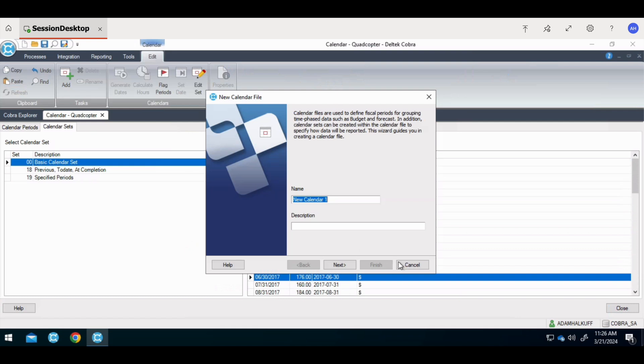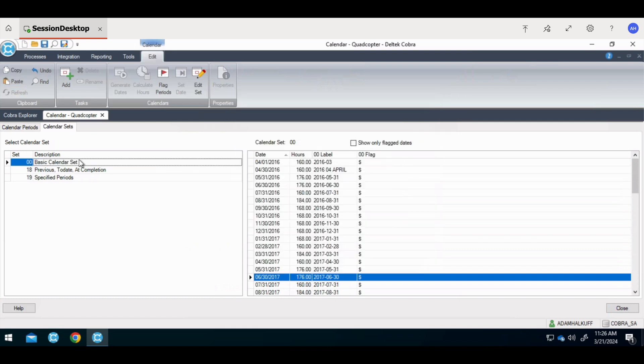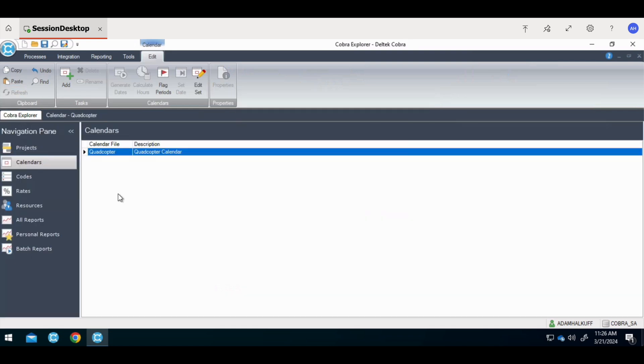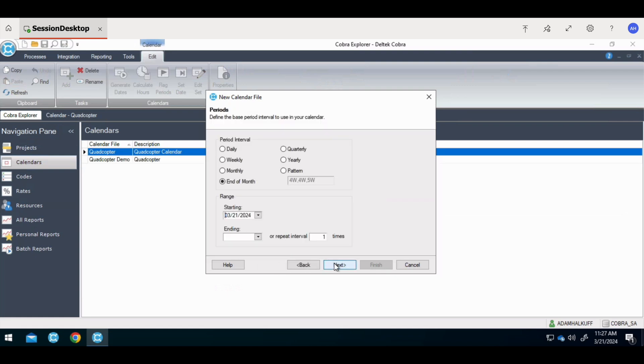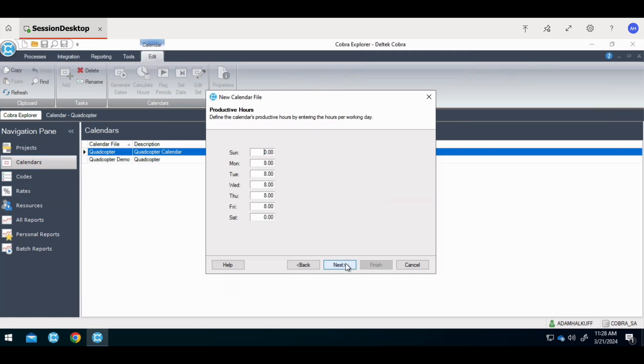To create a new calendar file, we're going to choose new calendar file. We'll name this calendar file and give it a description. It's important to remember not to name the calendar file the same as any other file. In the periods dialog, select the end of month period interval. This will end our fiscal period at the end of every calendar month. Always start the calendar at least two periods prior to the start of the project and push the end date of the calendar beyond the period of performance end date by several periods to provide buffer for extensions in the project. This also allows this calendar to be used as a template for other project calendars.